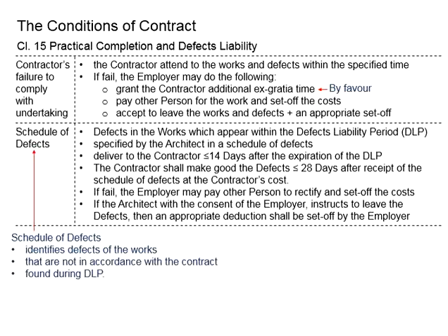The third option is the employer can accept the work or defect without rectification, and the contractor does not need to proceed with the rectification work. However, there will be an appropriate offset due to the relevant works and defects. The amount to be offset is normally more or less equivalent to the cost that would be paid to another person for the rectification works.